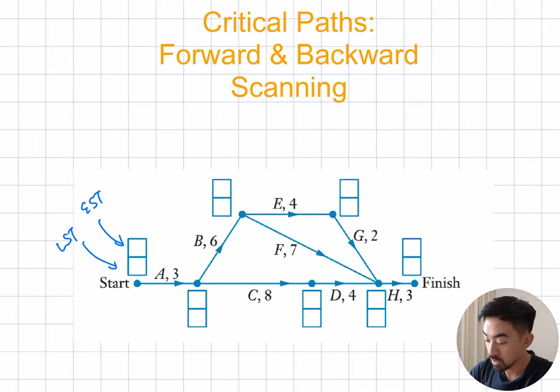What I mean by that is we're always going to start with 0. So I'm going to put a 0 here and go along the edge. 0 plus 3 gives me 3 in the next box. So I keep going up. 3 plus 6 is 9. Next one down, 3 plus 8 is 11. Up here, 9 plus 4 is 13.